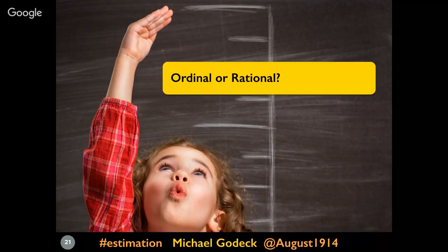And so the idea is you're looking at these unknown story problems, and your sense of uncertainty and your sense of risk grows exponentially the more uncertain you are about what's going to happen. So you can assign these bigger and bigger, exponentially bigger numbers that are associated with it. The relative complexity of Fibonacci sequence estimation lends itself to different team members using the same value to represent different amounts of work. It's really easy to fall into that under any circumstances, but Fibonacci, I think, really lends itself to that problem. And so we'll look at attempts to control that with story points, right? That's how story points try to rein in that kind of disassociative use.